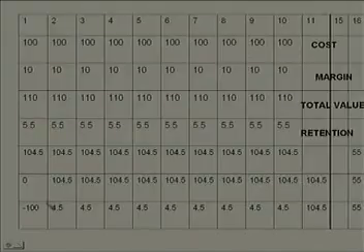So, what is your net cash flow for month 1? Your cost was how much? Rupees 100. As against that, how much money you have received? Nil. So, that means minus 100 is your cash flow. That means you have to arrange 100 rupees for month 1.